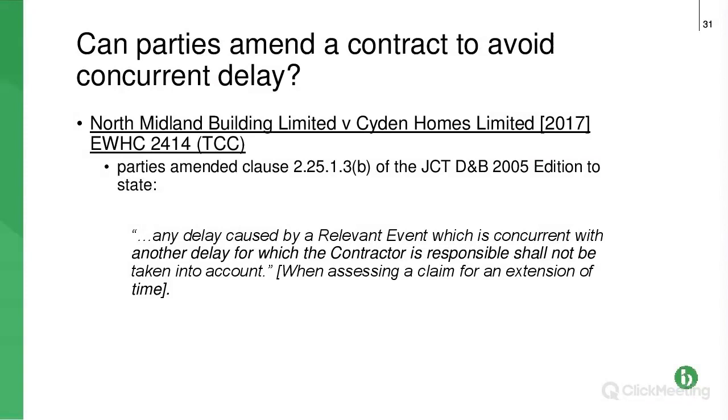But what it's saying here, be careful, if an event that's a relevant event is concurrent with another delay for which the contractor is responsible, so, for example, contractors not got enough personnel on site, then that delay, and it goes on to say, shall not be taken into account when assessing a claim for an extension of time.